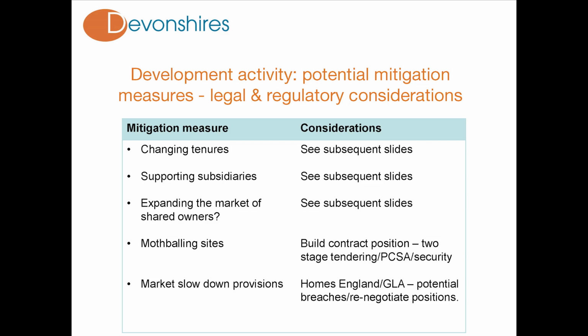Just wanted to put two comments on for two other things that we're seeing at the moment. We're not going to go into further detail, but it was just to talk about mothballing of sites. We have, of course, seen that clients are looking at potentially slowing down on sites or not bringing sites forward at this present time. There are, of course, on-costs in relation to holding on to a property and not commencing development. Those could be planning provisions being triggered, associated costs with that, and security costs. It's important that when considering mothballing a site, the original purchase contract is reviewed, and the terms upon which you hold that land. If, for example, there's an obligation for you to start on site by a certain date, or penalty payments or LADs, these would all need to be considered prior to